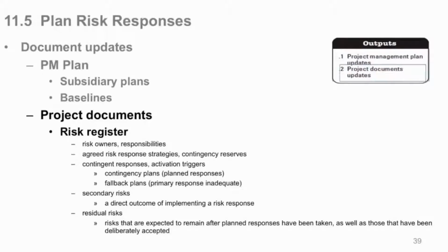So even on a smaller scale with risks on your project, at some point you may have to say, that's the trigger, activate this response plan. So it's up to you, the project manager, to make that decision. And like any kind of activity or risks we deal with, once you deal with a risk and you fix it, which was not really intended to be done at all during the project, that's why it's a risk, and now it's realized, you're going to have possibly secondary risks, which are new risks that come to light as a result of you activating your response plan.